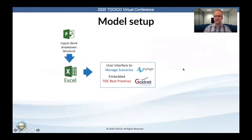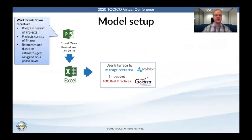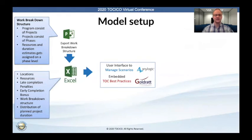The model architecture is actually quite simple. The model setup involves taking an export from your project management system, like Microsoft Project, and importing that into an Excel document. Your work breakdown structure will consist of programs, the projects that make up these programs, and the phases that make up the projects, along with resource allocations, durations, and estimates. In order to add variability to the simulation, we asked the project managers for the additional data required: locations, which projects are location-dependent, the resources at specific locations, penalties for late completions, bonuses for early completions, as well as the distribution of project durations.